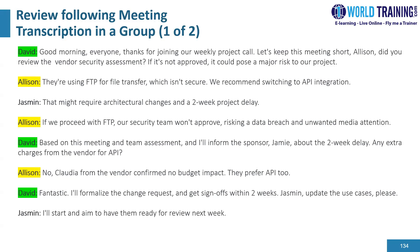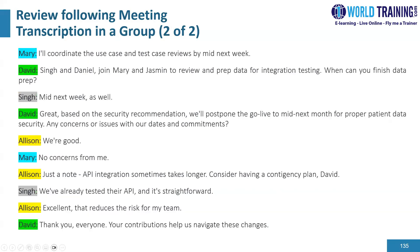David: Jasmine, please update the use cases. Jasmine: I will start and aim to have them ready for review next week. Mary: I will coordinate the use case and test case review by mid next week as well. David: Singh and Daniel, join Mary and Jasmine to review and prepare the data for integration testing. When can you finish data prep? Singh: mid next week as well. David: great. Based on the security recommendation, we will postpone the go-live to mid next month for proper patient data security.